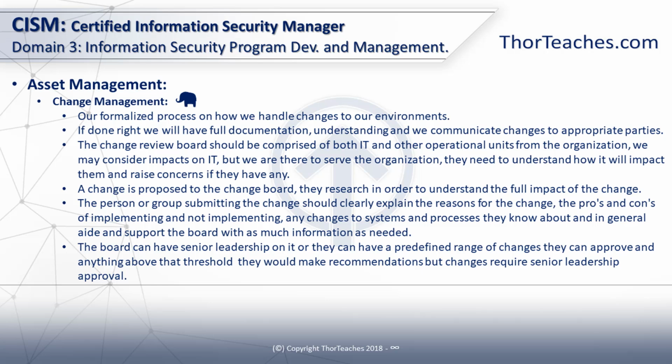And here we most likely need to be that translating link that can translate the IT talk into real people talk. If, in the example with the pharmacy server, we found a vulnerability in the software, we want to patch it, then we need to research, is this going to break anything else, just like we do with our regular patches? Why are we doing this? We need to clearly articulate, this is the reason for doing it, this is the good stuff that's going to happen if we do, this is the bad stuff that's going to happen if we don't.